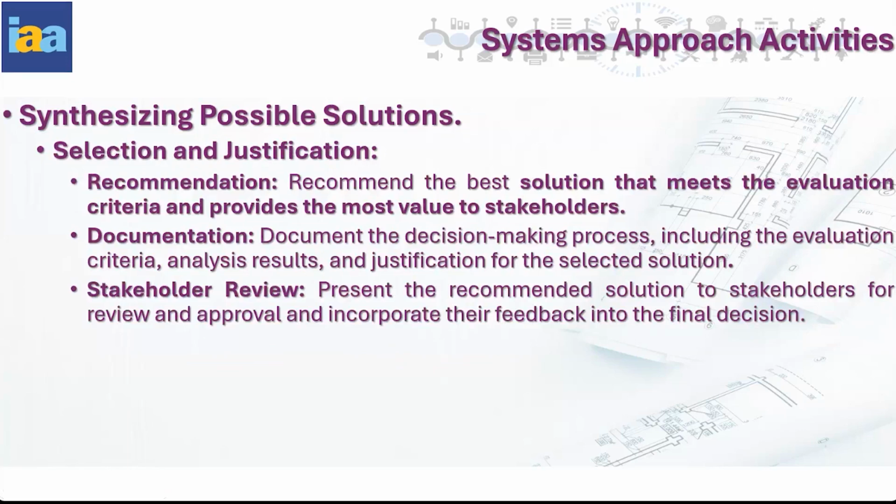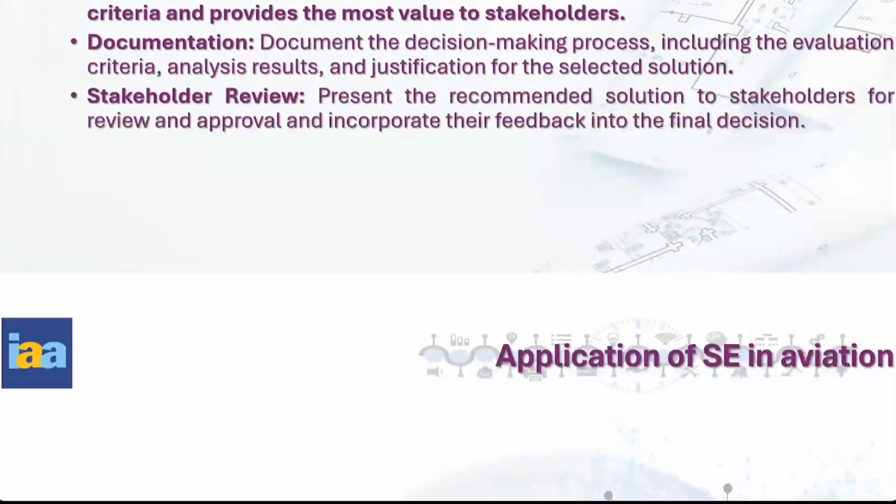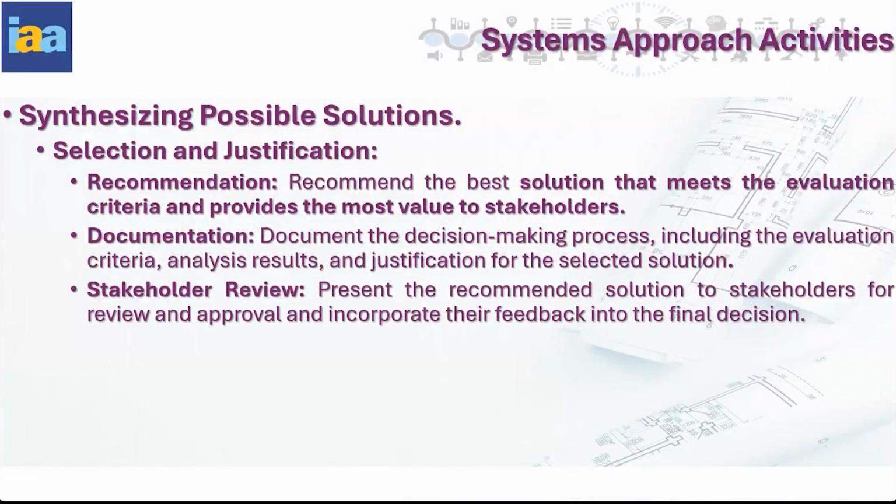See, suppose this is a big process I have described. You may think, for example, that you are installing an ASMG system or any other runway lighting system. Maybe you have outsourced this entire SITC project to somebody, but still, who will prepare the site? The site will be prepared by you only. The site will not be prepared by the SITC vendor.